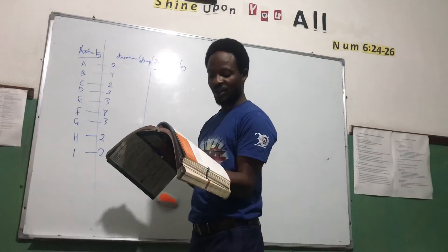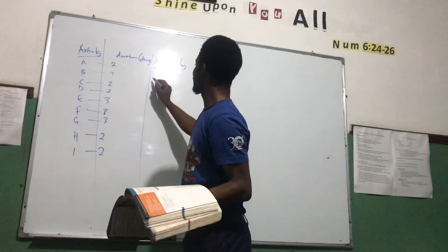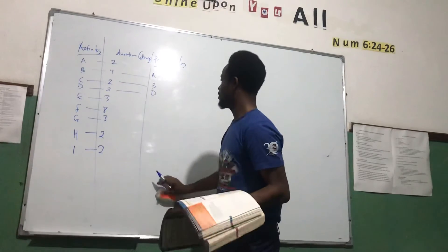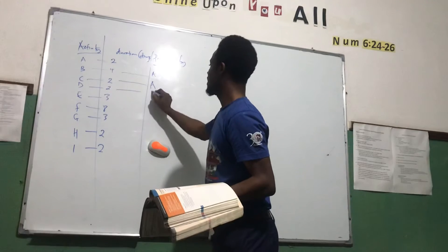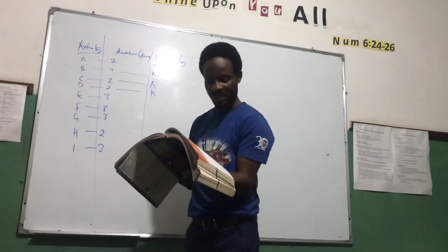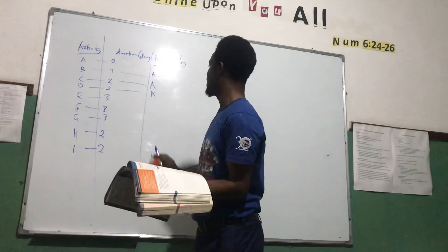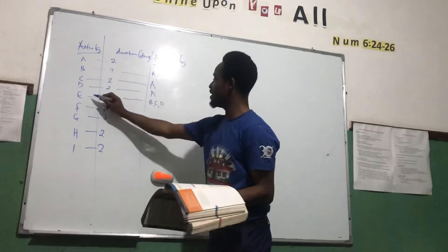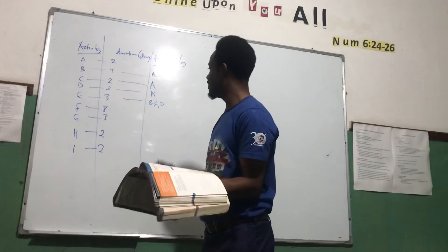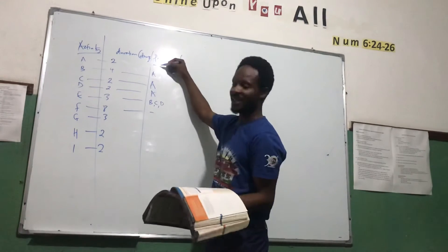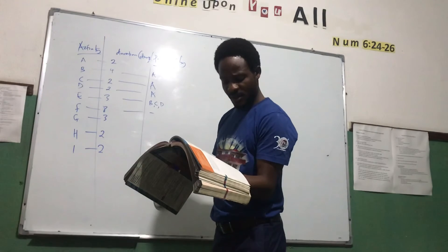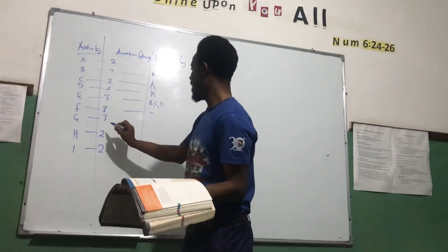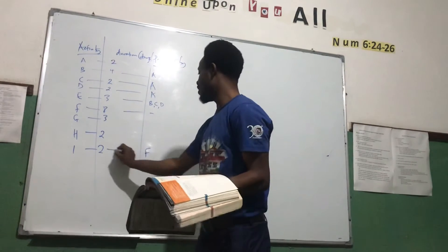B, C, and D cannot start until A is complete — so A must complete for B, C, and D to start. E follows B, C, and D, meaning E is preceded by B, C, and D. F has no preceding activity, just like A. F must be completed before I can commence.